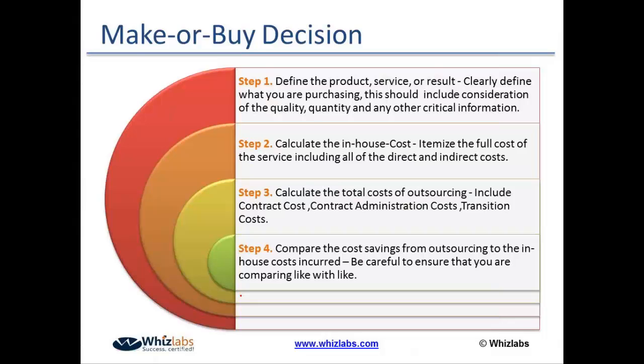We might go for it from a risk point of view, that this project work is very risky and we don't want to do the work in-house, we want to outsource it. It might be purely from a cost point of view, that doing the work in-house is costlier than outsourcing it, etc. So the procurement decision can be driven by any of these factors. But normally, when we go for a make versus buy decision, we keep all the other factors at their baseline value, and we make the decision based on the cost factor.